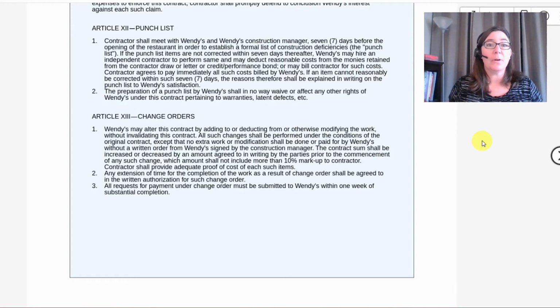So the important thing is that when a change is proposed, no matter whose idea it is, it needs to be written up in a written document. It needs to go through an approval process, and it has to actually be approved before any of the change takes place.